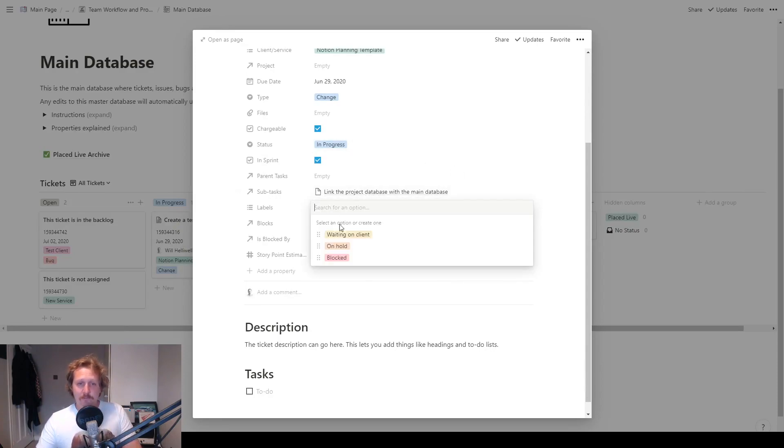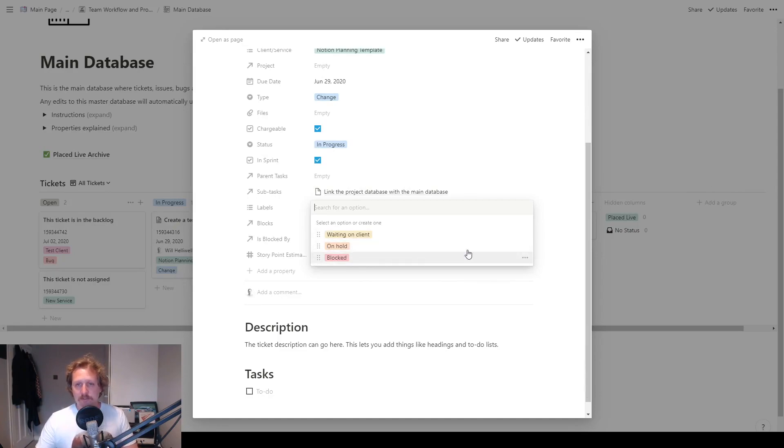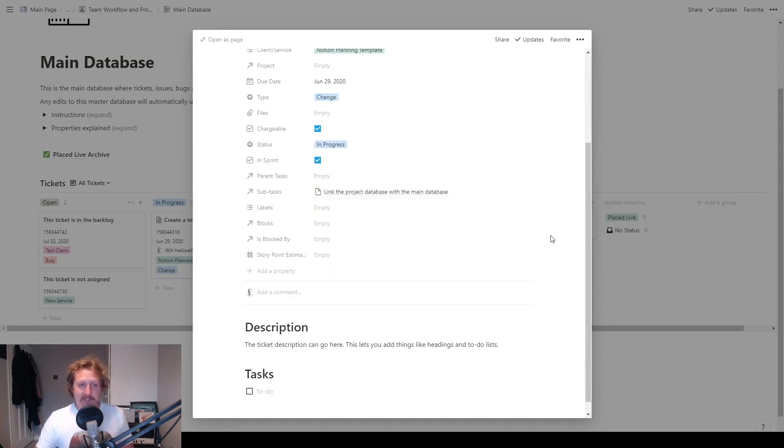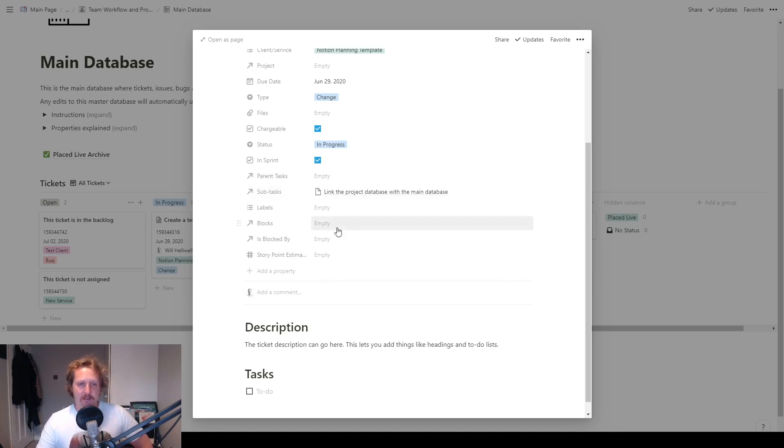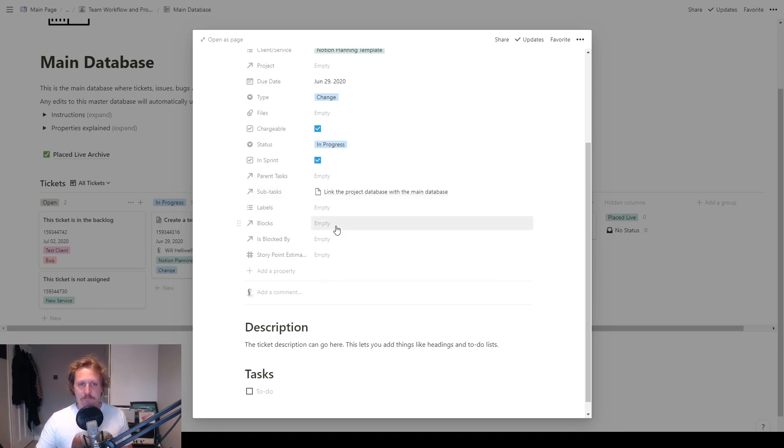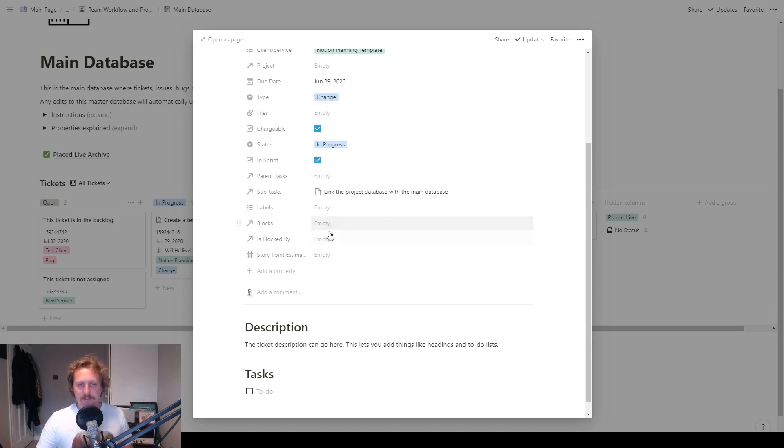Labels. We can add anything that we want, waiting on client, on hold, blocked, anything else that you might want to add in there. Blocks and is blocked by works the same way as parent tasks and subtasks. If one ticket is stopping another one from being completed, then you say this one is blocking that one. And then it'll be reflected on either ticket.